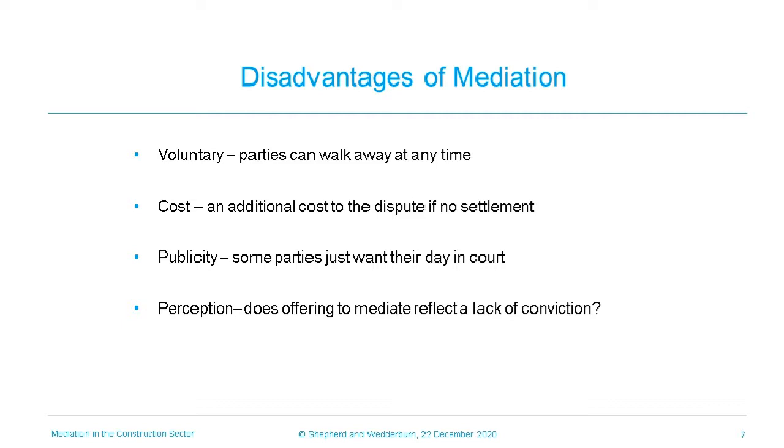Having said that, if parties were reluctant enough to consider abandoning the process, then it is unlikely that they would have reached a settlement in any event, and so forcing them to be there at the mediation would be of no benefit to either party. There is a growing body of case law in England in which parties are penalised for unreasonably refusing to mediate at the beginning of their dispute.